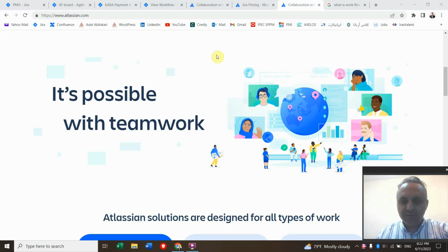You may know lots of project planning and control software such as Microsoft Project, Primavera, etc. In almost all of those, we start the work by defining the work breakdown structure, or WBS, of the project as its backbone. Then we continue to break down the work packages into activities, create the network between the activities, and the software will schedule the project based on the critical path method and give us the project schedule for the whole project scope from A to Z.